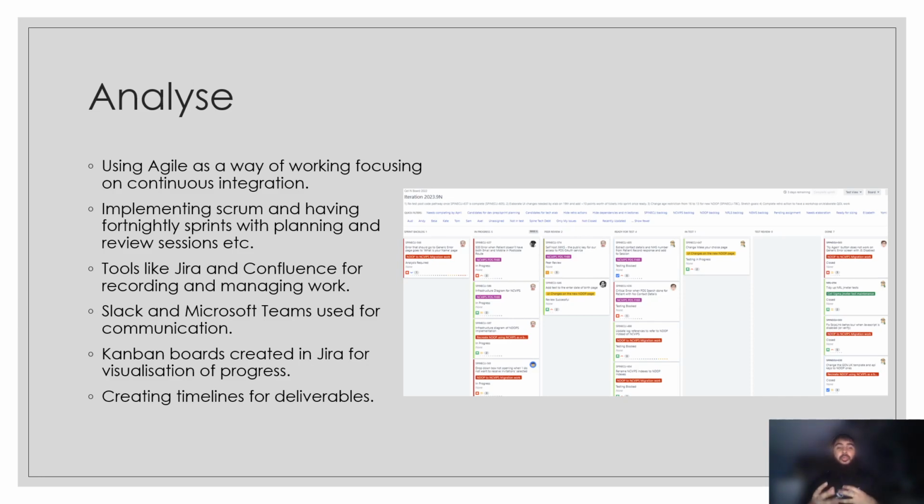And obviously I was also responsible for creating timelines for deliverables. So we had three key deliverables. First, upgrading NC VIPs to use PDS5, which is an updated service that the NHS is now using. Second, recreating End-Up, so this is the part where we actually make the new End-Up project and use NC VIPs as the base. And third, the UI changes to End-Up, making sure that we can take any changes that we need and apply them to End-Up so that it is actually the national data of that service and not just a clone of the national COVID vaccination immunization preference service.